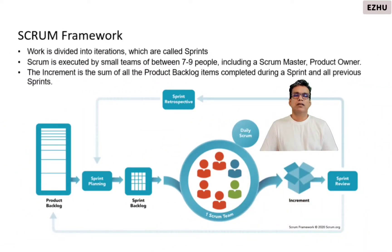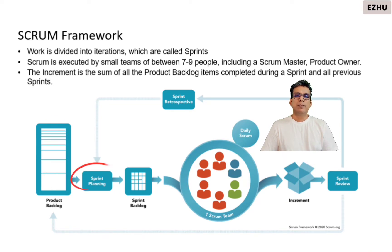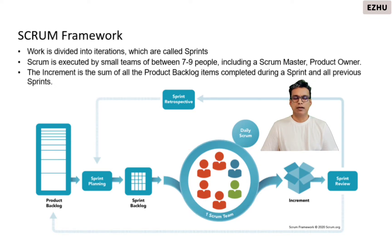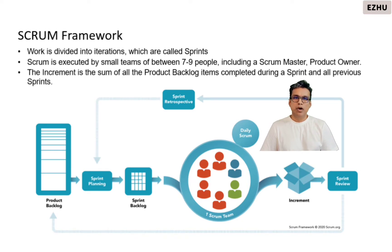In the Scrum framework, the overall product is broken down into features called stories, user stories, or epics by the product owner. These stories are then prioritized for each sprint or release cycle. A typical team consists of seven to nine members including a Scrum Master and a product owner. The intent of this framework is to ensure that at the end of each sprint, there is a demo given to the product owner who confirms the product meets the intended objectives.